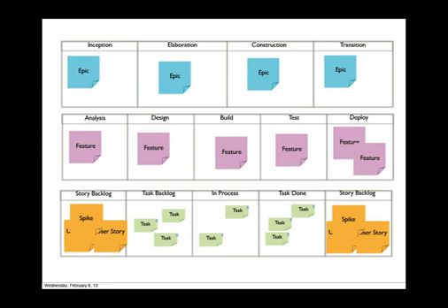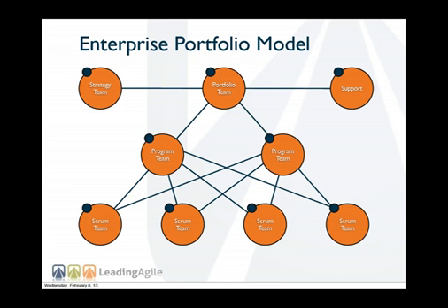Maybe like in a services-oriented kind of architecture, maybe the feature level is actually what the product is, but the user stories are going out and getting farmed out to various services teams to provide certain other capabilities into the product. What we find sometimes is that we end up with bottlenecks and dependencies when that happens. This work has to be sequenced and it has to be aware.